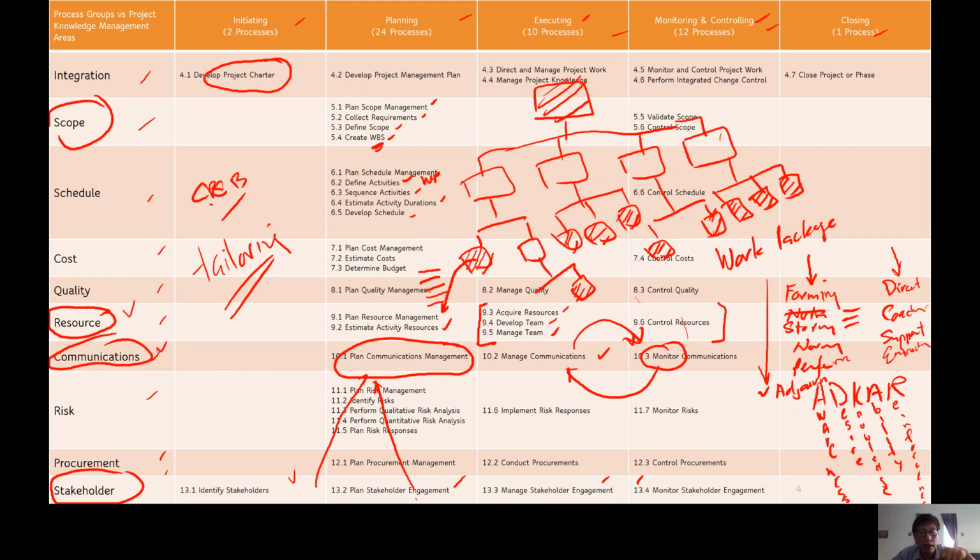So we have to look at whether we are going to problem solve, good cause, okay? Or we collaborate, or we call it compromise, or should we force, or should we withdraw, or in this case here, what's the other word, smoothing, taking one day at a time, but it will be a lasting solution, that kind of thing. It's like sweeping things under the carpet for the moment. It's called smoothing. So there are 5 kinds of conflict management techniques that we learn under control resources.